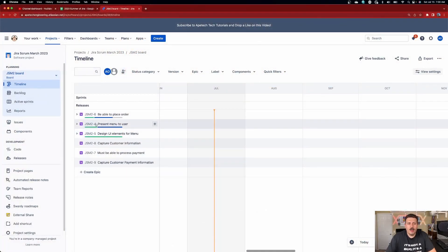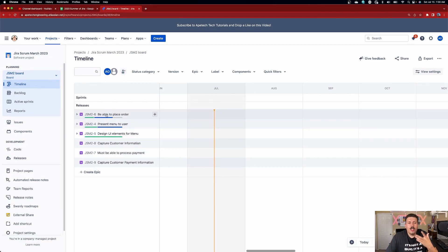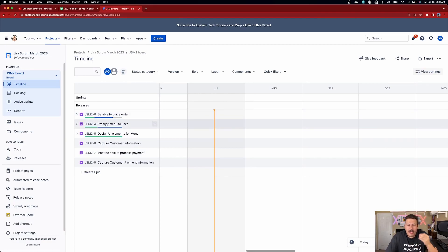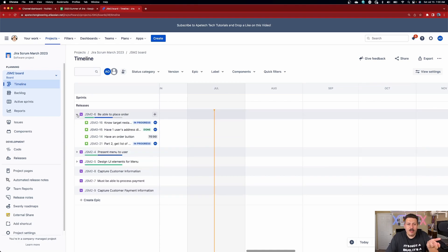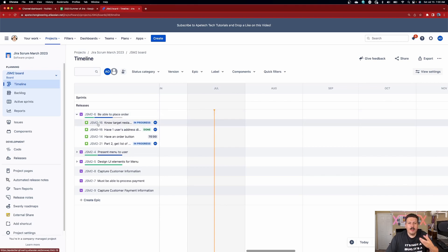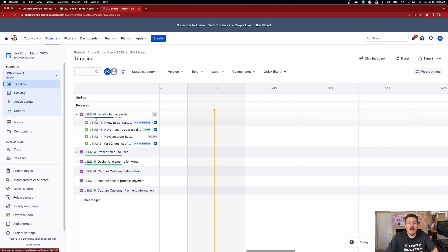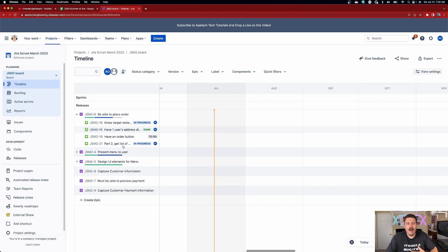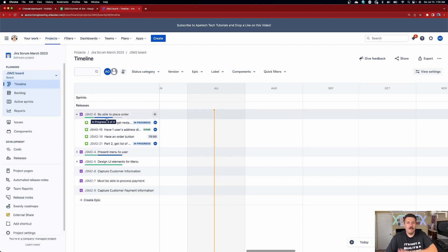When you're in this timeline view, Jira really takes advantage of epics. The timeline is designed for epics and stories. You can see that your epics will have a progress bar, and it's going to tell you — based on the number of children and their statuses — how the epic is trending. Are we close to delivering this functionality? You can associate your stories, tasks, and bugs to this epic and have better visibility as to how that epic is doing from an overall functionality and capability perspective.